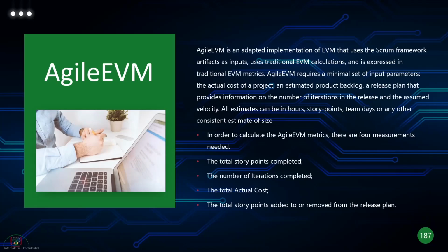It's not going to give you the cost, right? If you want to track the cost or you want to check the expected return on investment, if you want that kind of information, you need to use Agile EVM calculation metrics, right? So it'll provide you an estimate of the cost of completion, right? And that can actually help the stakeholders make decisions with respect to requirements in a release, if something needs to be changed in a release, things like that. So it's an excellent extension to the information that is provided in a burndown chart.